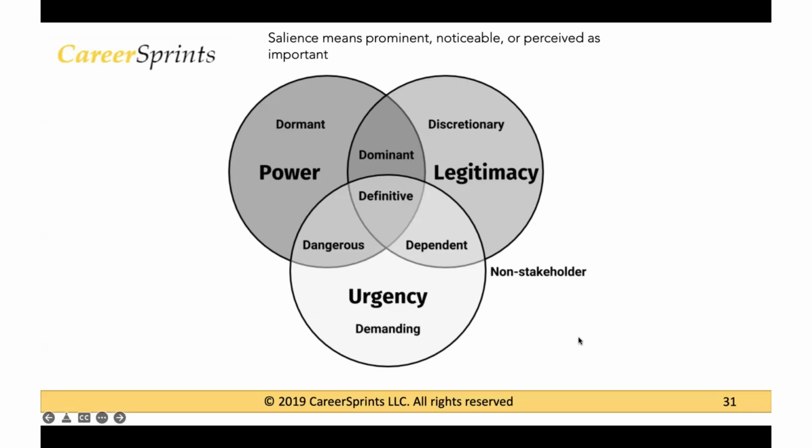Yes, Jidesh, it will affect the project. In many projects, stakeholders come and go, like people resign from the company or the project manager changes. So many things happen because projects can have a long lifespan. So definitely, a change in stakeholders will affect the project. That is why it is better to do projects in shorter bursts.